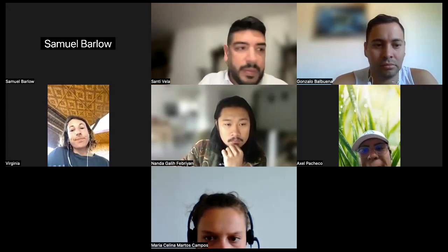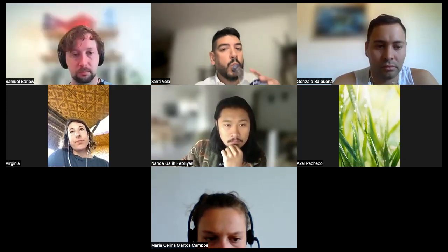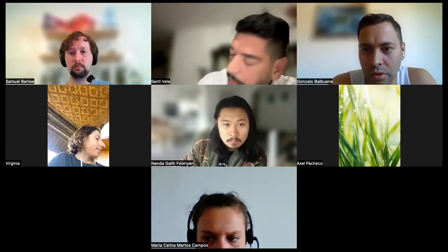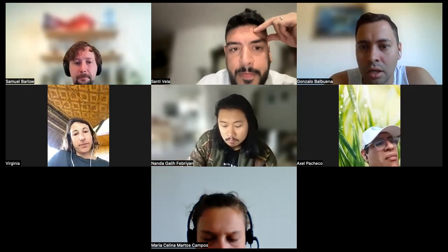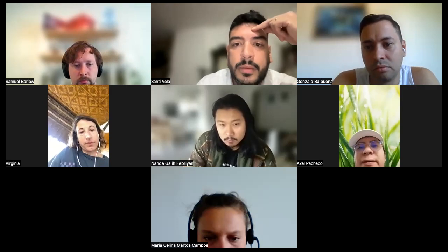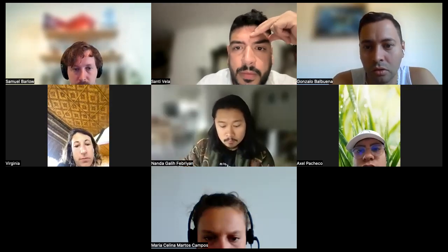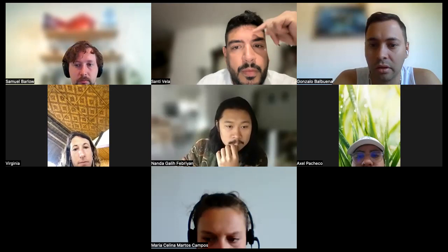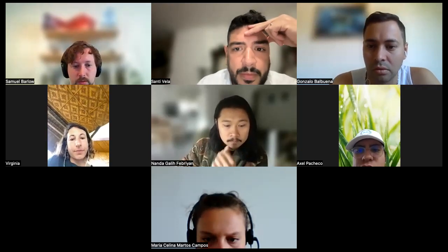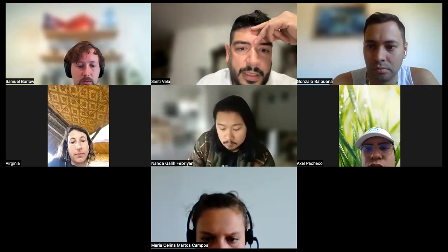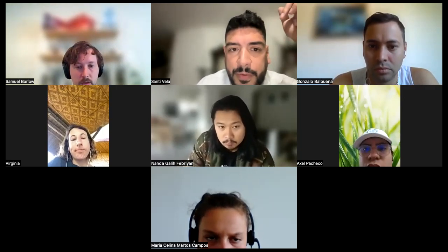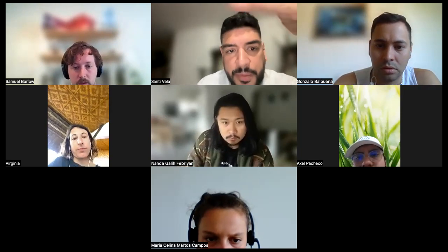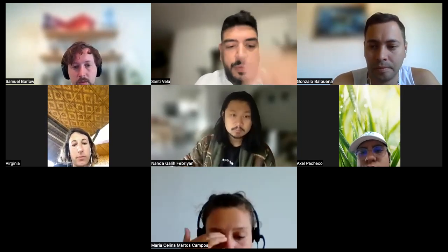Gonzalo, once again, can you repeat that question, please? The answer to that question. Yes. First, description of all project activities when we have the WBS done. Description of all resource requirements, human resources and tools, whatever we need, cost of those resources, duration required to complete the activities. We can use historical data and lessons learned, and information related to business accounts. That's it. The last one is very important, to be honest, because you need to reconcile what you spend against some business accounts. All right, that's good.